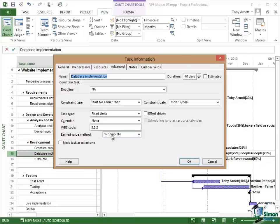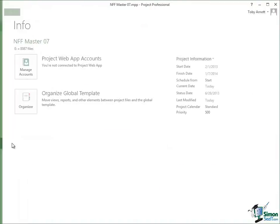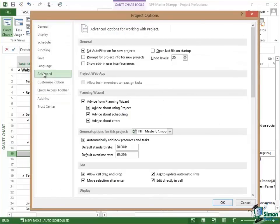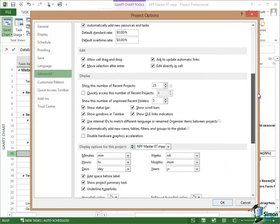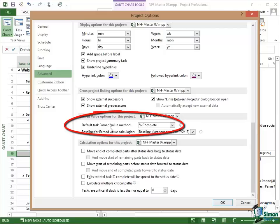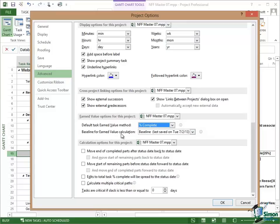You may have all or some of your tasks set to percent complete or physical percent complete. To set the default, so this is the one that's applied on all new tasks, if you go into the Options and down to Advanced, I'm going to scroll down the Advanced Options somewhere down there, two sections from the end, Default Task Earned Value Method Percent Complete. You can have that set either way. I should point out while we're here by the way, Baseline for Earned Value Calculation. You may change your baseline and if you do change your baseline and you want your Earned Value Method to use the newer or even the older baseline, then this is how you change which of the baselines the Earned Value calculations are made against.